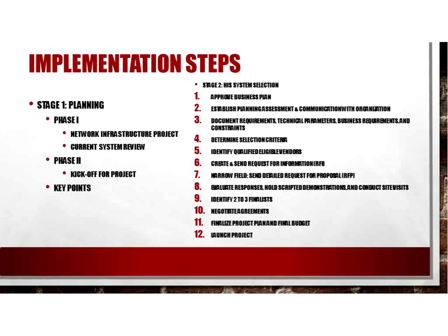All right. Your network infrastructure implementation project. So you might have that project team, and you might divide that project team up into subgroups that handle different aspects of that. And then also in stage 1, which is your planning, that's your phase 1. Your phase 2 would include your systems and technology that are going to be more advanced and require the base systems and infrastructure to be in place. So therefore your kickoff for your EHR project will occur in phase 2.